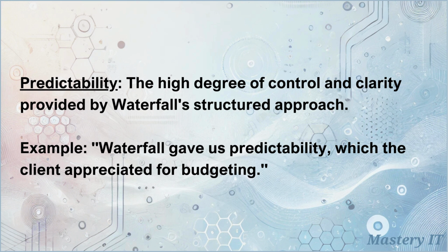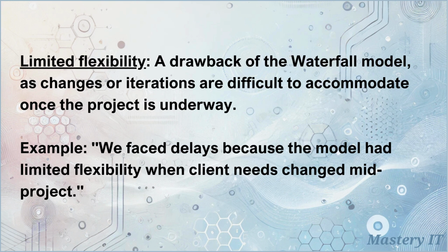Predictability, the high degree of control and clarity provided by Waterfall's structured approach. Waterfall gave us predictability, which the client appreciated for budgeting. Limited flexibility, a drawback of the Waterfall model, as changes or iterations are difficult to accommodate once the project is underway. We faced delays because the model had limited flexibility when client needs changed mid-project.